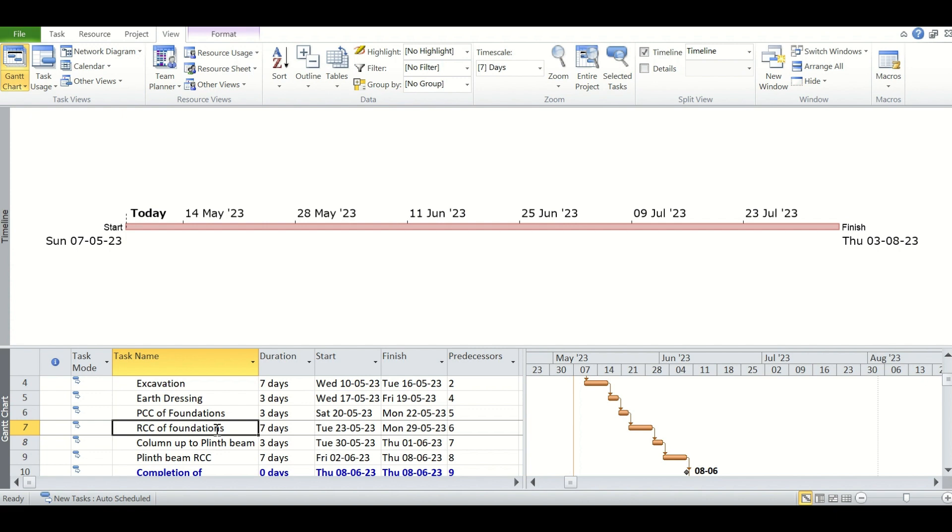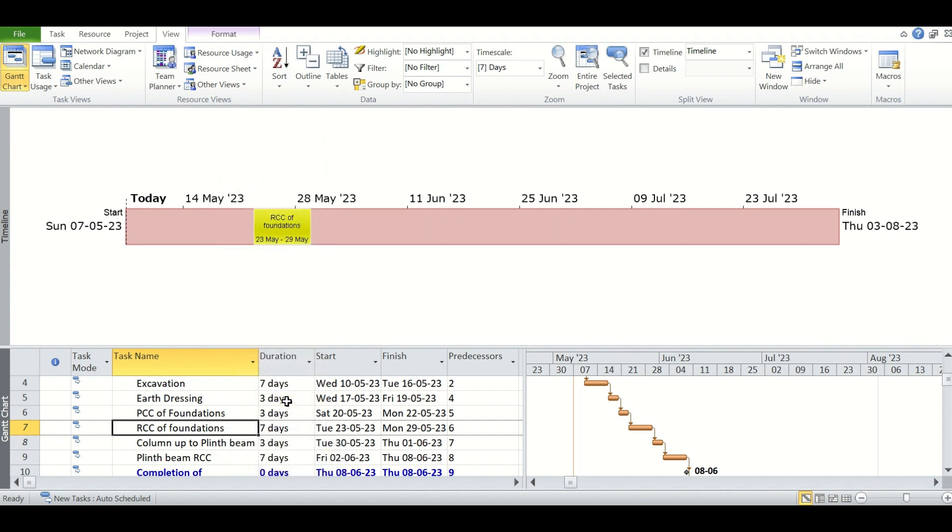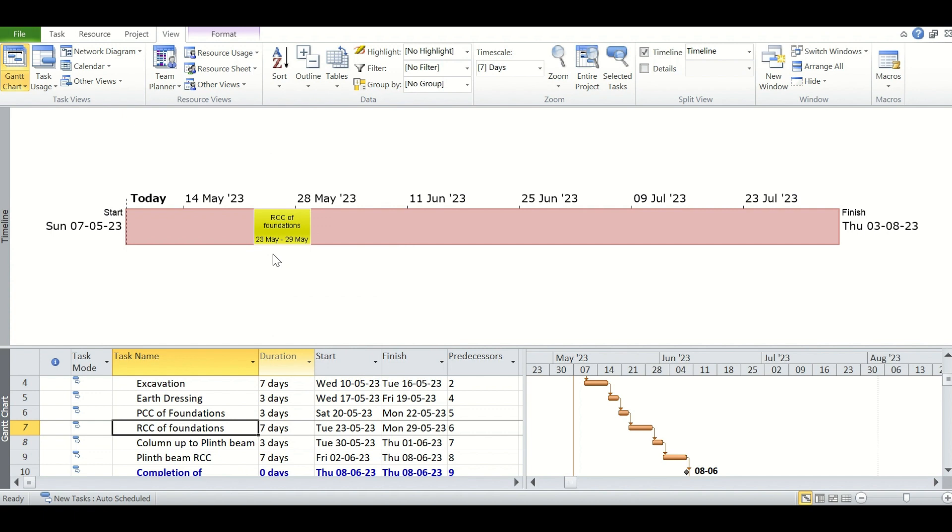To add this to the timeline, we will simply go to the task in the Gantt chart below. While selecting the task, we will right-click and click on add to timeline. You can see from here there is an option add to timeline. Now you see in the timeline we have created, it now has one task on it.